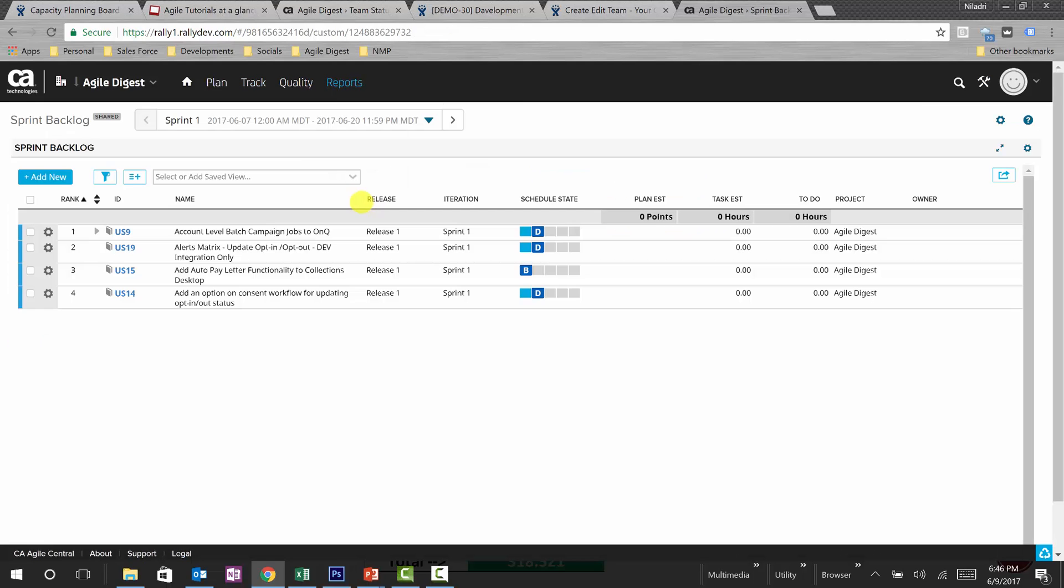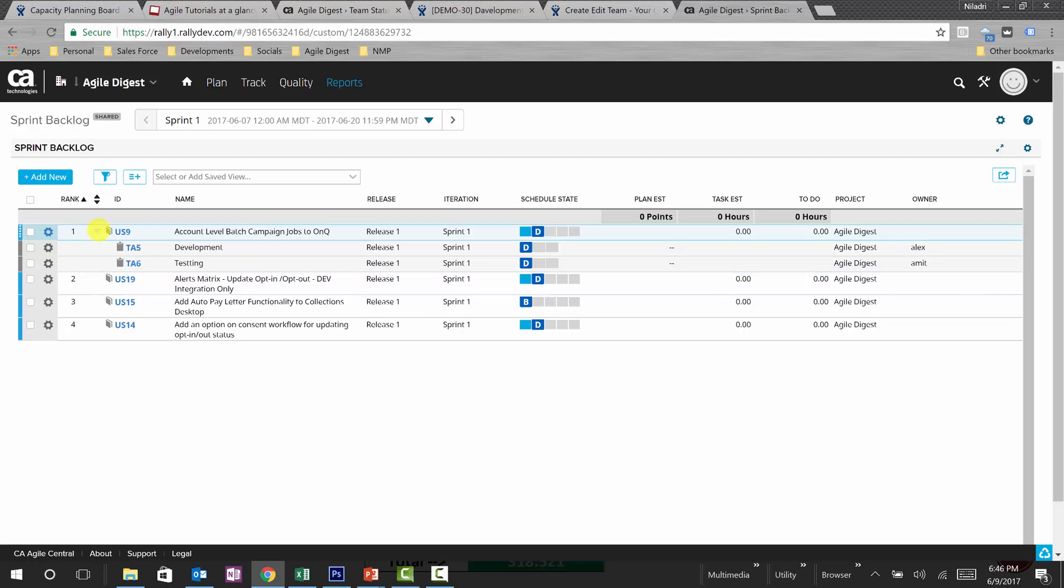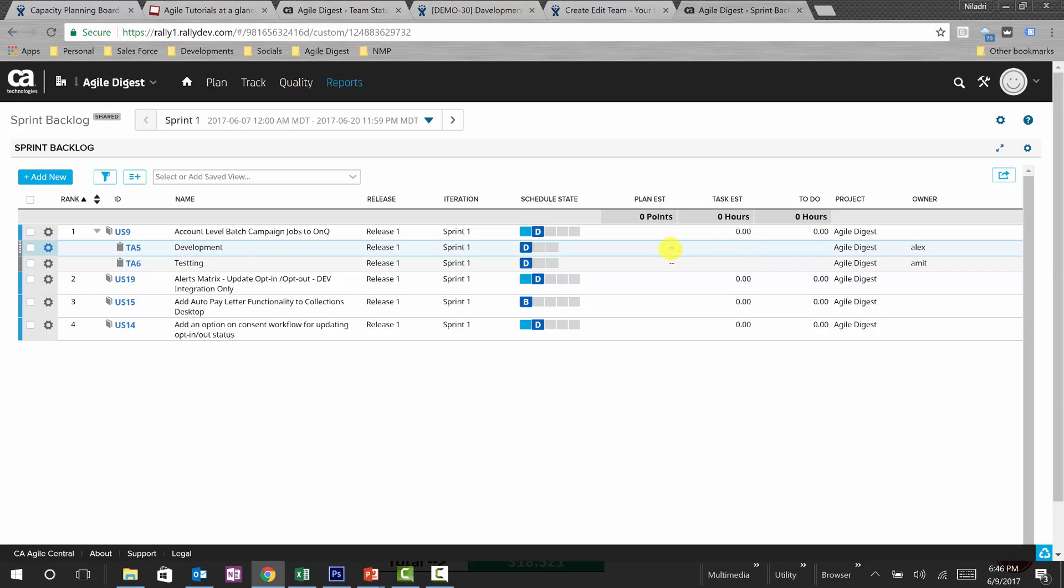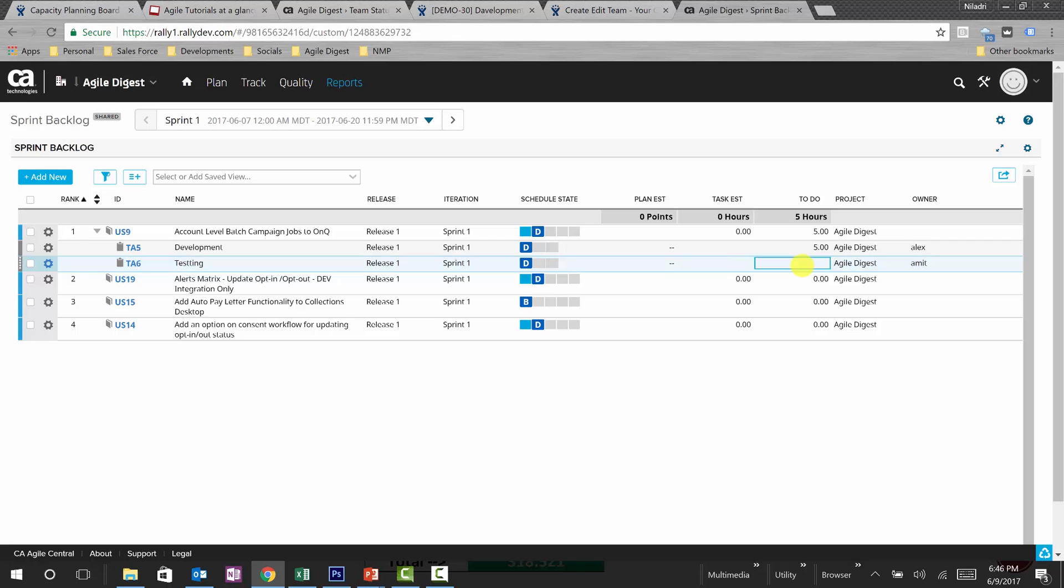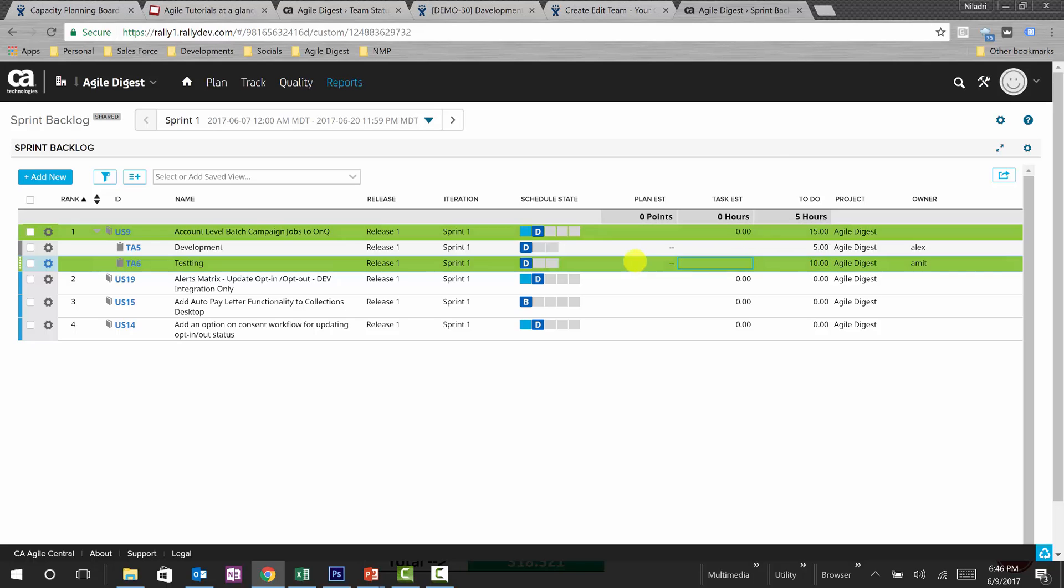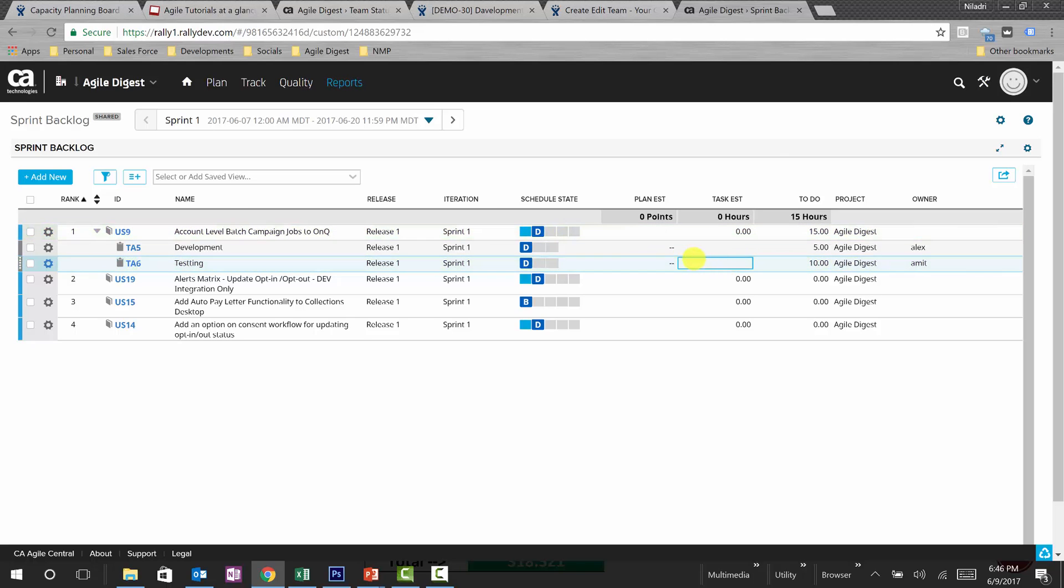As of now there are tasks, but in our sprint backlog we don't have any estimated efforts to those tasks. So if we actually look into this US1, there are two tasks we have but there was no plan estimate. So what I will be doing is I will be marking a to-do for five hours here and 10 hours here.